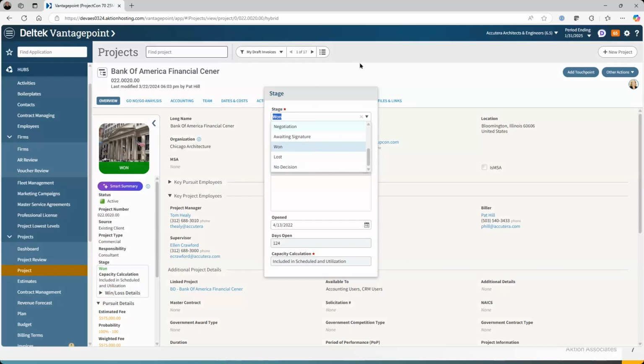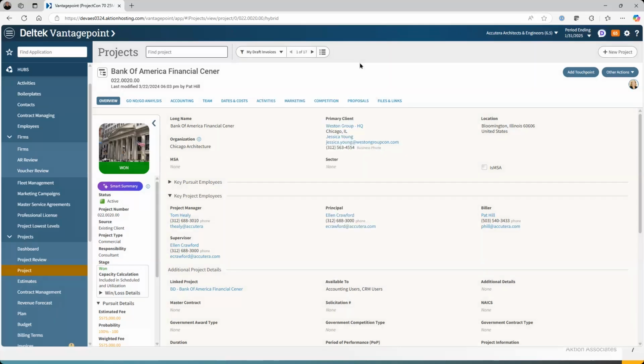And typically most clients will have this regular project here as you take it through what's considered in pursuit stages, and then have a promotional project that's collecting the costs while you're chasing the work. And when you win the work, this project goes alive here. But everything gets retained on the regular project, and the promotional project's really just out there to collect data.